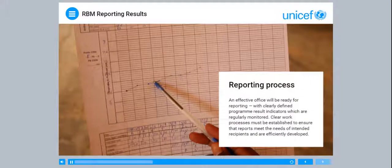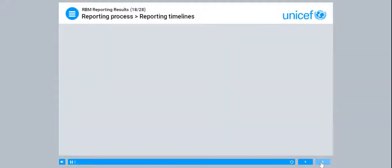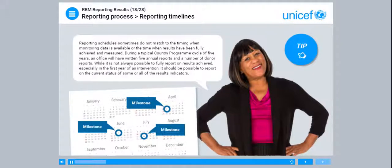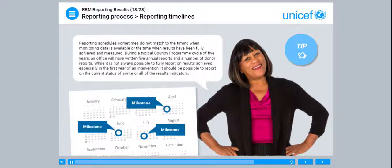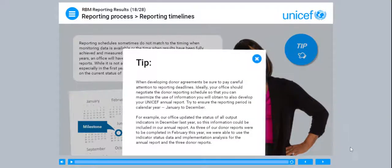Lesson 3: Reporting Process. An effective office will be ready for reporting, with clearly defined program results indicators which are regularly monitored. Clear work processes must be established to ensure that reports meet the needs of intended recipients and are efficiently developed. Reporting schedules sometimes do not match to the timing when monitoring data is available, or the time when the results have been fully achieved and measured. During a typical country program cycle of five years, an office will have written five annual reports and a number of donor reports. When developing donor agreements, be sure to pay careful attention to reporting deadlines, and ideally negotiate the donor reporting schedule so that you can maximize the use of information.